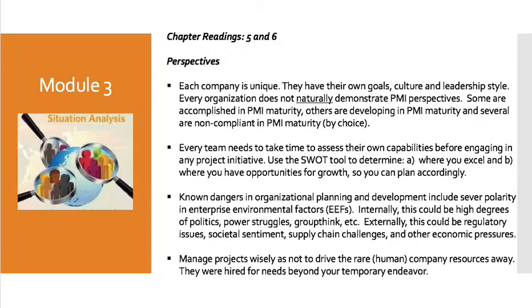So be aware of those things and include those in your scope statement as well as in your risk management plan so that you can identify them, assess them, determine their probability, determine their potential impact score, and then set aside some funding, some contingency funding, so that you can figure out a way to mitigate or avoid these things.